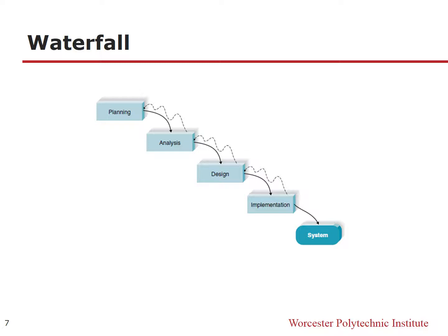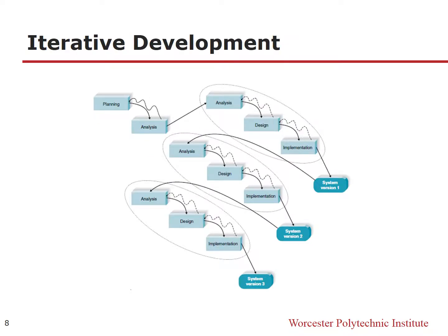So in order to avoid that problem, here comes iterative development. Iterative development is a method of rapid application development. It is in order to avoid suddenly changing any steps. Iterative development divides the system into different versions. First, finish the most critical and core functions in the very early version, and then develop the others in the following versions. But there is a big disadvantage in this method.